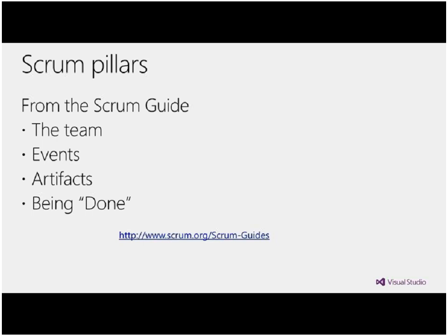In the same way, each team and each company will define ways of doing Scrum and will therefore work with their own customers in slightly different ways, choosing different states and adding extra states instead of just to do, in progress, and done. I've seen teams add, for instance, in testing and then done as a way to track also. And also Kanban, some people say Kanban, but the right pronunciation is Kanban, is an add-on on top of what you can do with Scrum. And therefore, the idea of Agile in general is realizable with TFS for any kind of Agile methodology, and not just Scrum, not just MSF Agile, and not just MSF CMMI. Feel free to experiment with customizing it in your day-to-day activities.